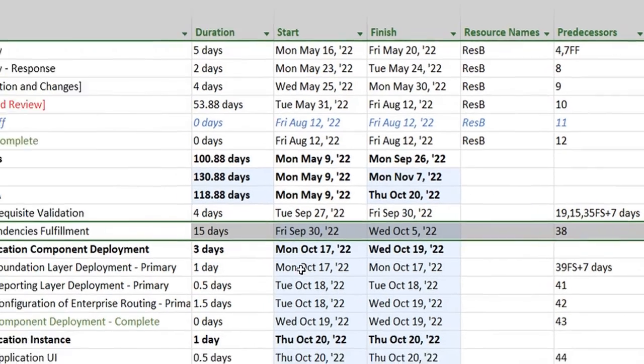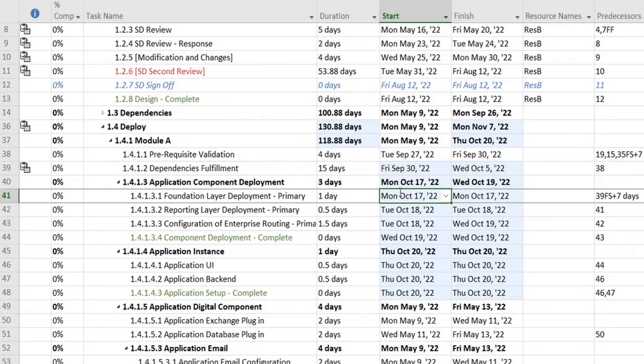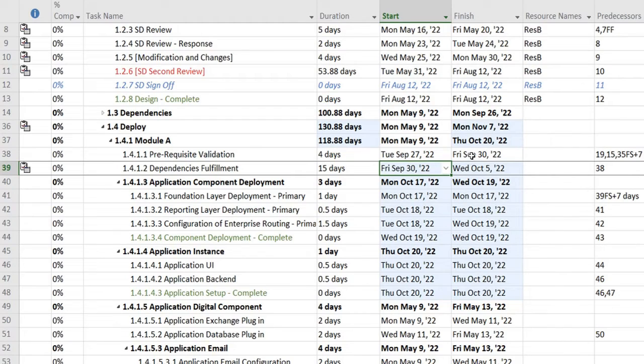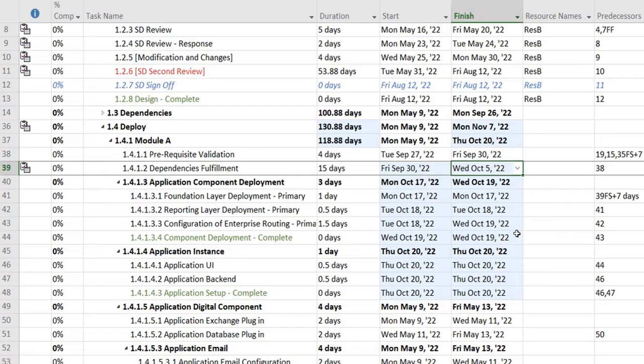So you see, as soon as I click OK, the task that was initially starting off on a Monday after its previous predecessor was completing is immediately shifted to start from Friday. The overall completion was somewhere in the third week of October and has now been shifted to October 5th.